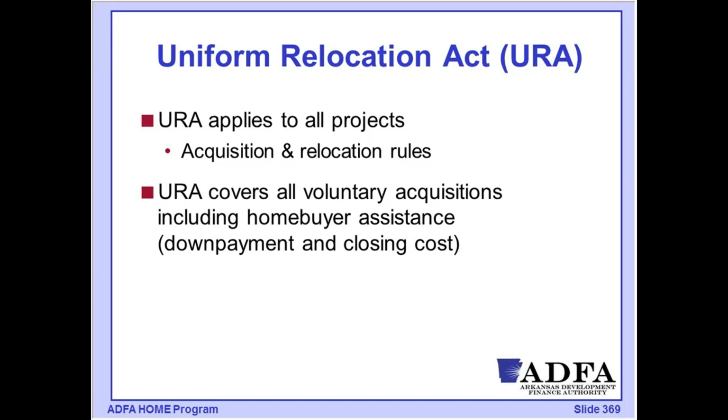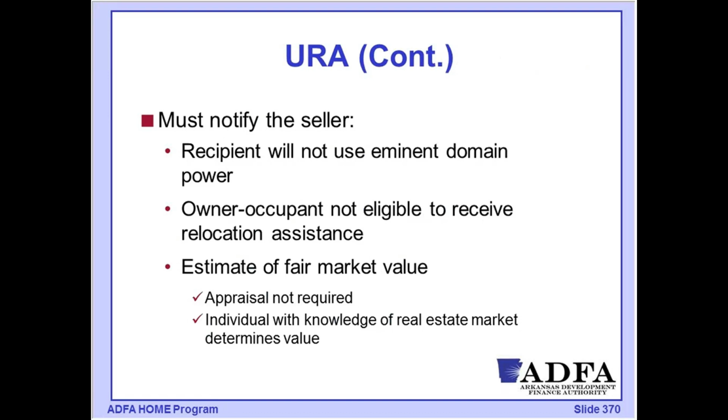So when we're doing down payment assistance and closing costs, we need to have that documentation in place. I would think that probably most everything that's going to be done as an acquisition is going to be a voluntary acquisition. ADFA is not going to be using its potential power of eminent domain on this. So we're going to be documenting each of our acquisitions as a voluntary acquisition. This has to be completed prior to executing that sales contract.